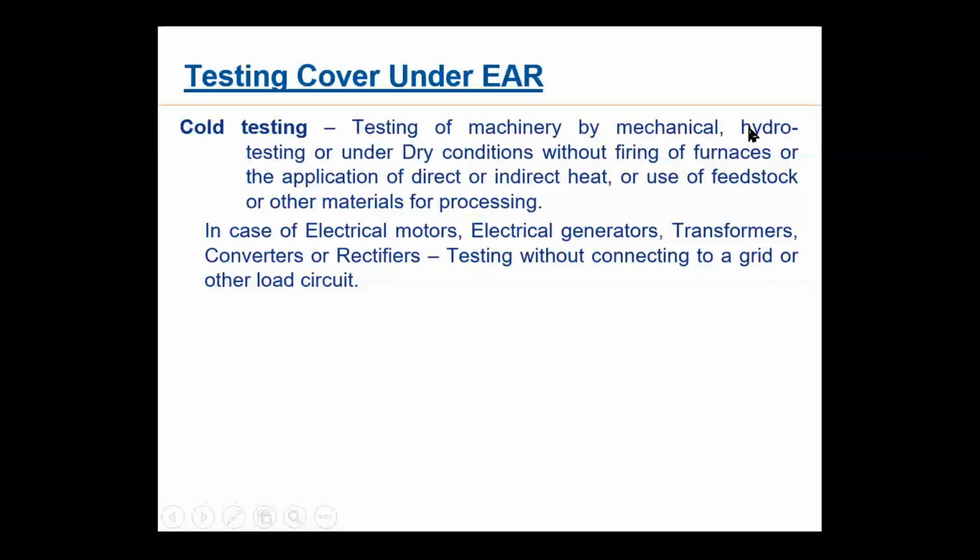So what do we mean by cold testing? Testing of machinery by mechanical or hydro. Hydro means you are filling it with water and then you are testing the machinery. All tanks, etc., they are hydro tested. They are filled with water, with pressure, and then they are tested for any leakage. Pipelines, etc., are also hydro tested.